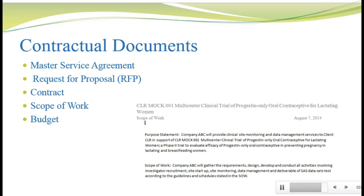The budget lays out the number of hours and dollars allocated to perform each task. Project team members are responsible for monitoring the budget and letting the project manager know if they appear to be going over the contracted hours. Norman Goldfarb has produced a nice short article titled 'Sponsor Agreements with Research Sites and CROs' — I want you to read the whole article, as it outlines the different contracts used by the sponsor when dealing with CROs and investigators.